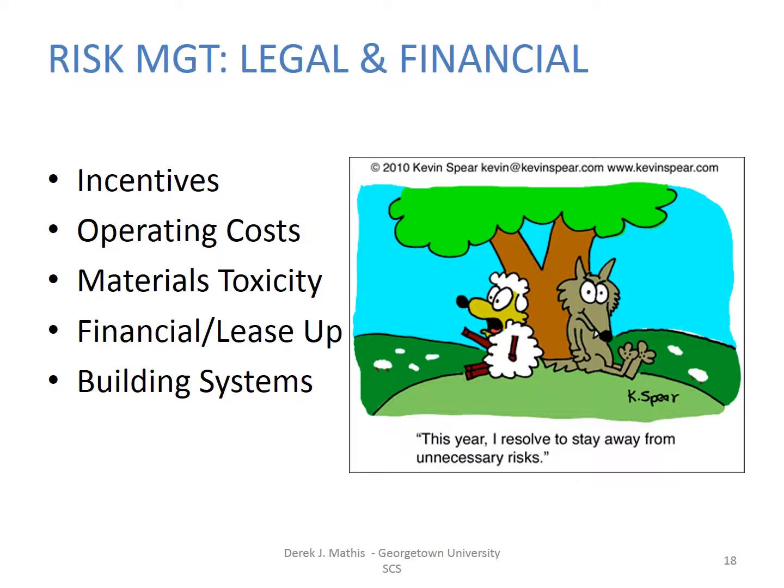The owners and their design team went through great lengths to mitigate this risk. Some of these potential risks include incentives, for example. Real estate developers and civic groups vocally opposed Durst and BOA's use of Liberty bonds. The bonds, they contended, were for rebuilding Lower Manhattan, not for new projects competing with downtown's already sizable block of vacant space. Had there been lawsuits associated with these incentives, it could have held up the project and potentially killed it altogether.